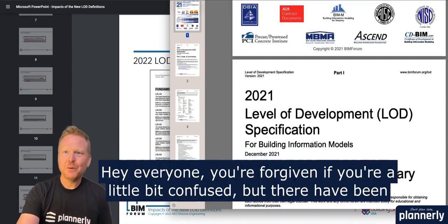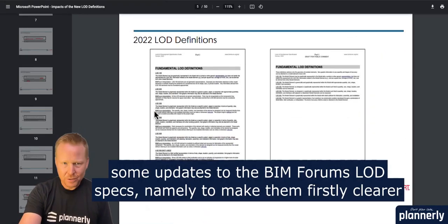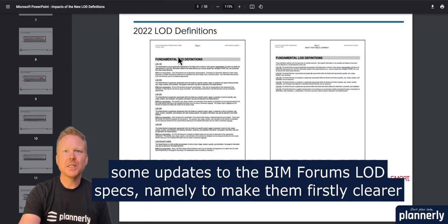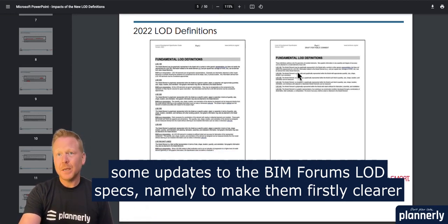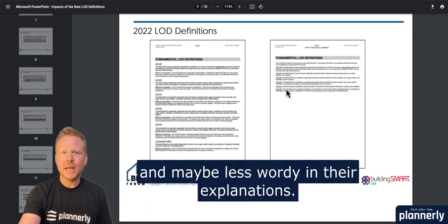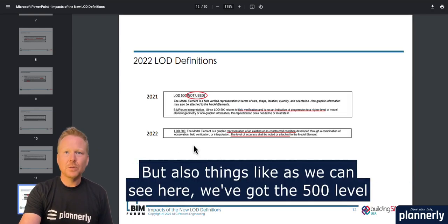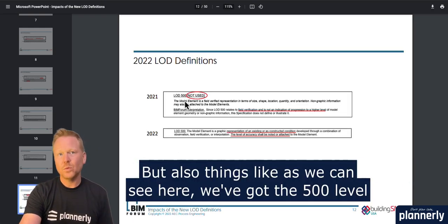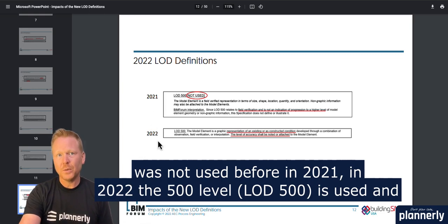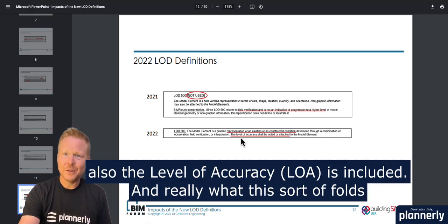Hey everyone. You're forgiven if you're a little bit confused, but there have been some updates to the BIMforum LOD specs — namely to make them firstly clearer and maybe less wordy in their explanations. As we can see here, the 500 level was not used before in 2021, but in 2022 the 500 level is used and the level of accuracy is also included.